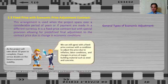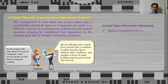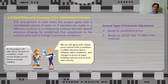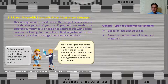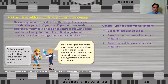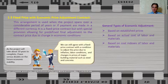In general, the types of economic adjustment are: first, based on established prices — adjustments due to changes from the agreed-upon level in published or otherwise established prices of specific items; second, based on actual cost of labor and materials — adjustments due to changes in specified costs of labor or material that the contractor actually experiences during contract performance; and third, based on cost indices of labor and materials — adjustments due to changes in labor and material cost standards or indices specifically identified in the contract. It is very important that the contract specifies which particular cost index to be used as reference.